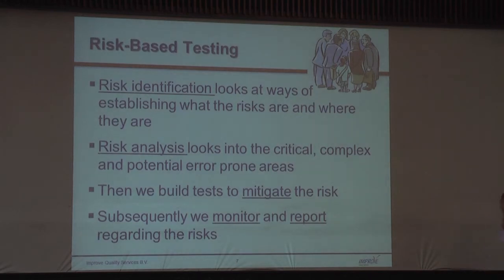And of course, after the identification analysis, we go into mitigation. We build test cases or do other things. So hopefully we take away some of these risks. And also part of risk-based testing is we report back in the same language we ask people information from. So risk-based reporting if you want. Okay? 4 steps.